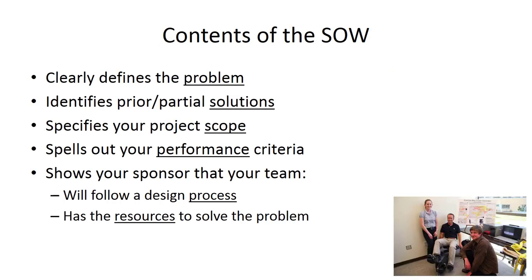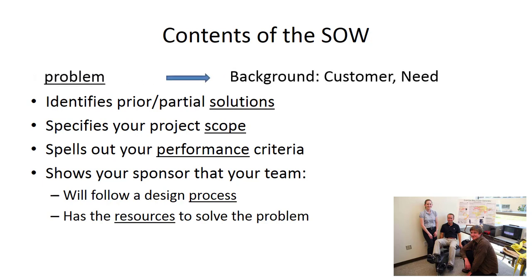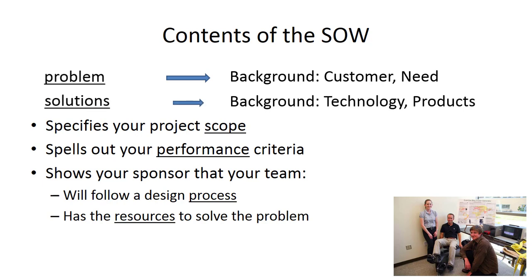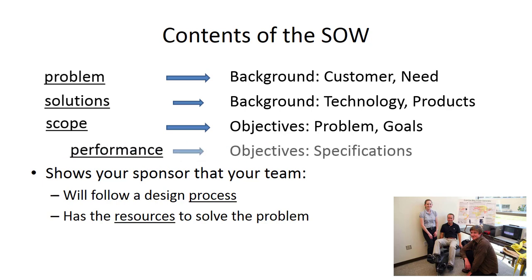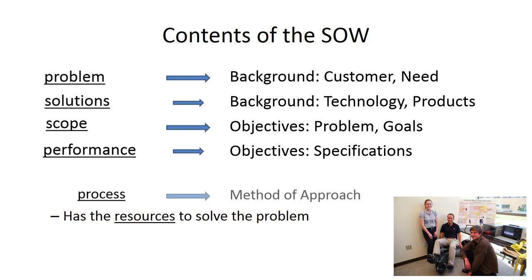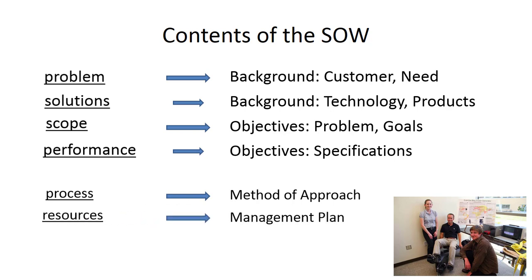Each of these topics relates to a specific item in the statement of work document. The problem relates to the background and the customer need — when you define the customer and the need, you are defining the problem. Solutions are captured in the background section devoted to the technology and existing or similar products. Scope shows up in the objectives section where you define the problem and goals, and performance is also in the objectives section, specifically the specifications part. Process shows up in your method of approach section, and resources are in your management plan.